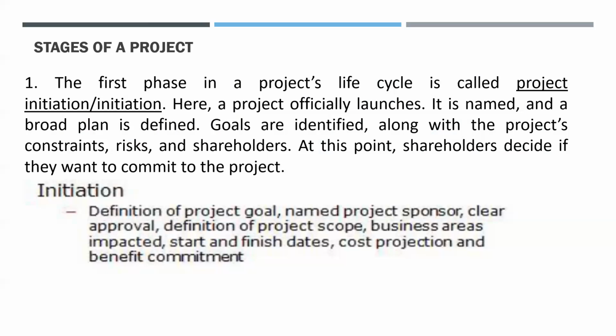Sorry, the project charter I mentioned a while ago is one of the inputs to the initiating process. This process addresses and documents the project and deliverable requirements, product requirements maybe, boundaries of the project, methods of acceptance that can be accepted in the project, and the high-level scope control. In a multi-phase project, this process validates or refines the project scope of each